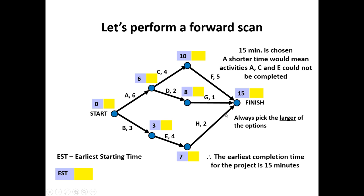When you have one, two, three, or more options, multiple options coming into a final vertex, or any vertex for that matter, a node, you have to pick the larger of these options when you're performing a forward scan. So in this case, the earliest completion time for this project is fifteen minutes.